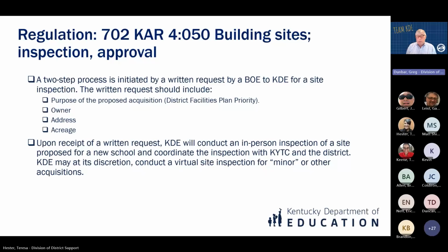On receipt of this written request, we will conduct an in-person site inspection of a site proposed for a new school and coordinate that inspection with KYTC in the district. However, at our discretion, if it is what we're going to refer to currently as a minor project, we may conduct a virtual site inspection. Next slide, please.